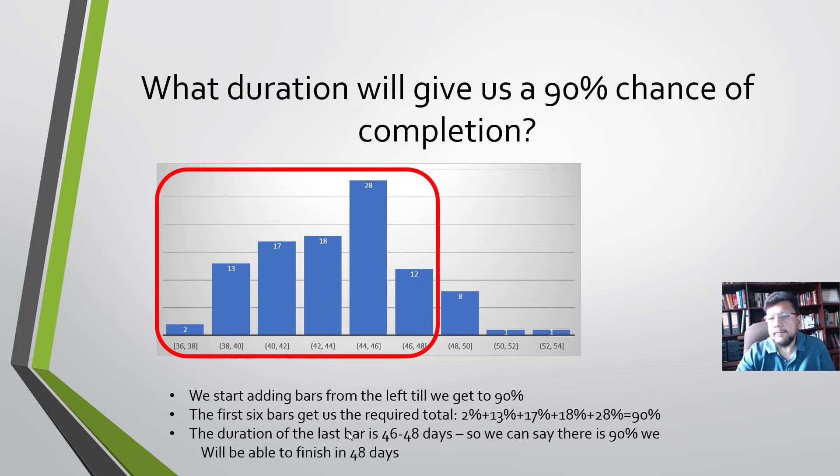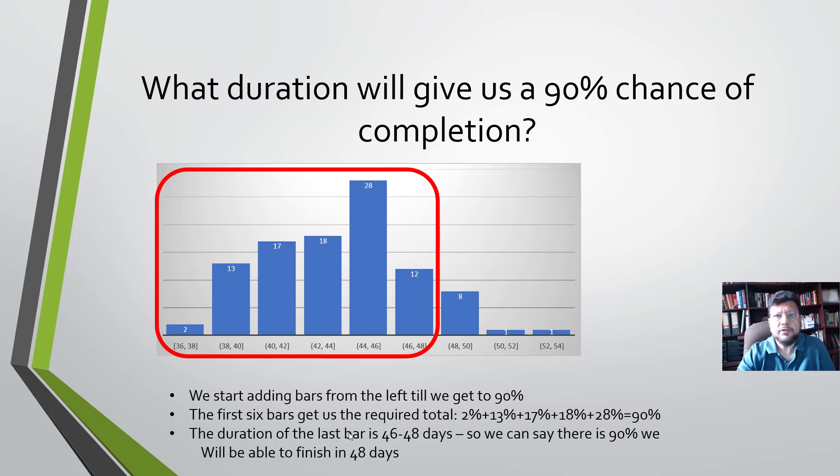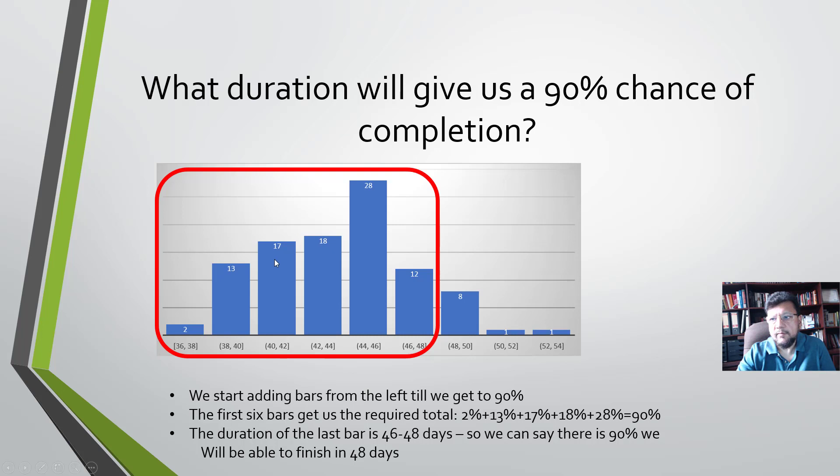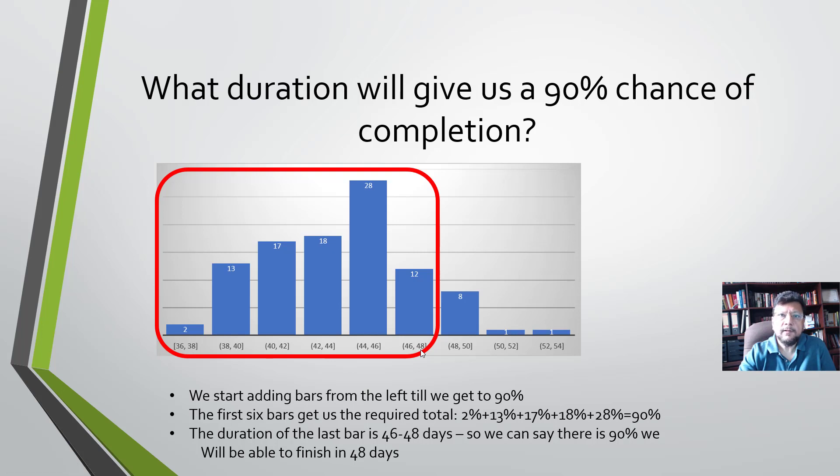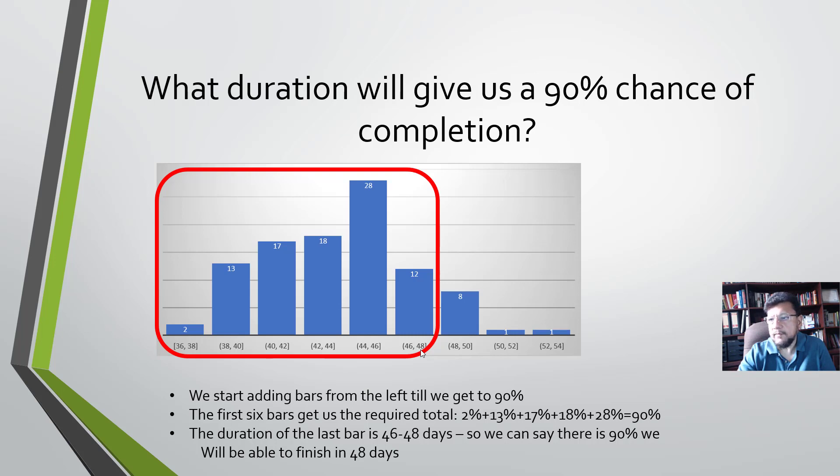Next, we can ask the question: what if we want to pick a duration where we have a 90 percent chance of completion? To get to the 90 percent, we start adding the bars until we get 90 percent. So 2 plus 13 plus 17 plus 18 plus 28 equals 90 percent. That takes us to the 46 to 48 range, which means we can be 90 percent sure that the project will be complete in 48 days.